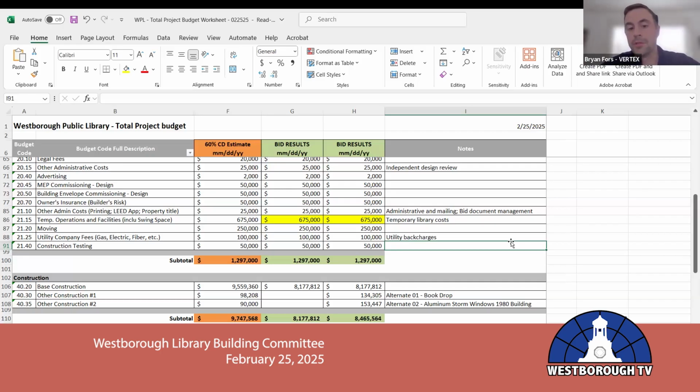I just don't want to be put in a position where if things do snowball or we have scope creep at the temporary library, we're going to have to take from a different contingency, whether it's our soft cost contingency or construction contingency, to cover some of the temporary costs. And so I think we're close, and I don't think you're wrong in the number that you gave. Yeah, I think it's important too to keep ourselves in the mindset that it's a temporary thing and that we might live with some things. You're quite a ways apart there in real dollars, though. But this is true.